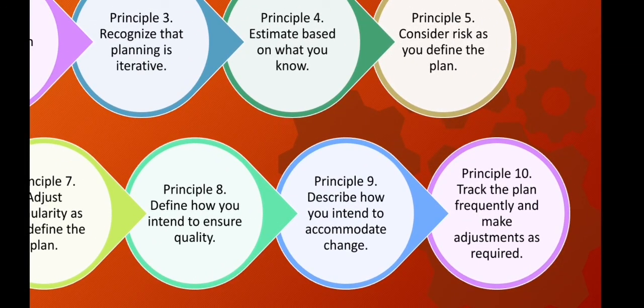Principle nine: describe how you intend to accommodate change. Even the best planning can be overtaken by uncontrolled change, so have plans for customer requests so that if they need to change something, you can adapt. Principle ten: track the plan frequently and make adjustments as required. Software projects fall behind schedule one day at a time, so look at the plan daily and keep track of your progress.